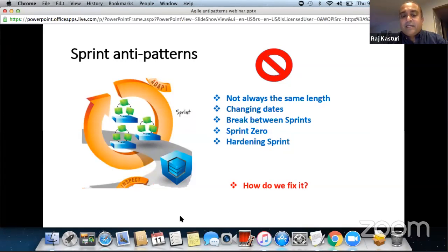You have to be careful when you define a definition of ready. The problem is it kind of gives the impression that these items are not ready, so the development team is not open-minded to say, oh, until these things are done, we are not going to be ready. So it's okay to have a couple of bullet points to say the minimum we need to have is an acceptance criteria. The minimum that we need to have is a value. But if you have more than that, then you're kind of creating your rules around the waterfall to make sure that this won't be done.